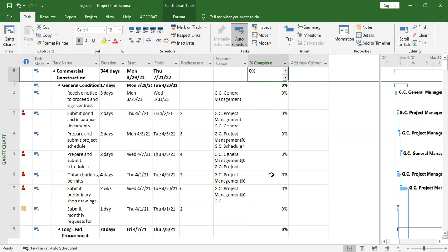It means that you've not marked progress. It is up to you to input the progress. The software cannot automatically detect it. It is you, the project manager or the engineer, who has to say this task has gone 10%, 20%, 50%. If you put in wrong figures, it will also give you wrong results when you go for reports and anything else.